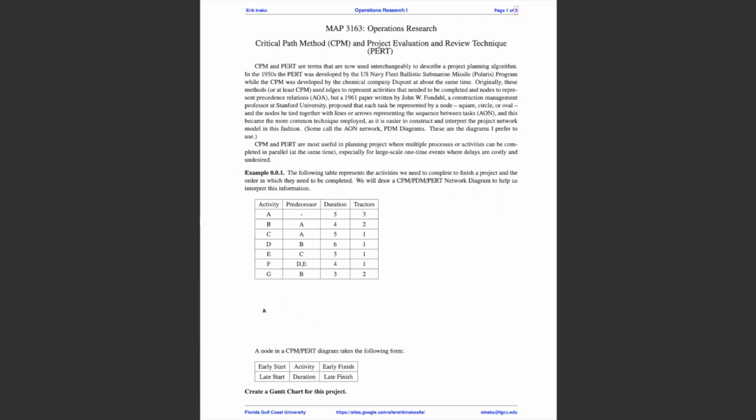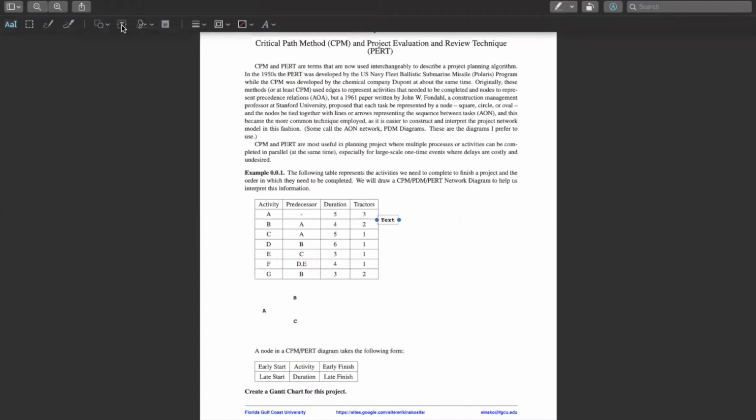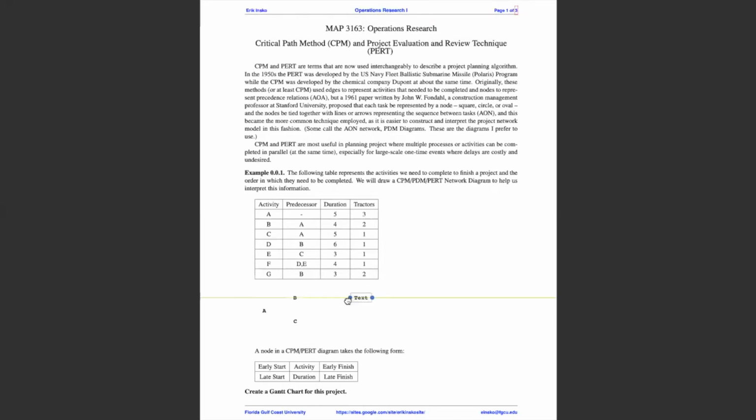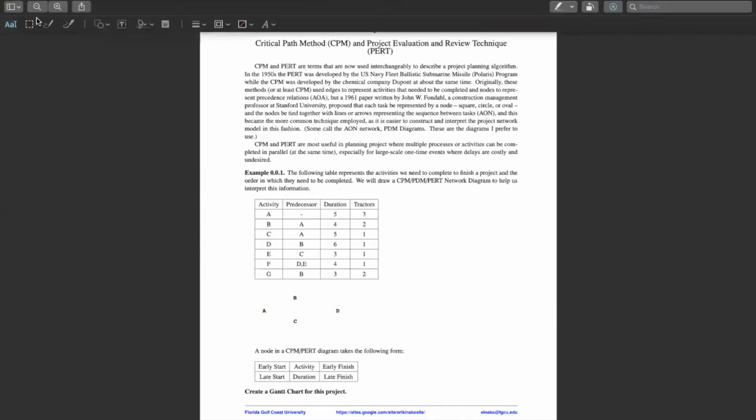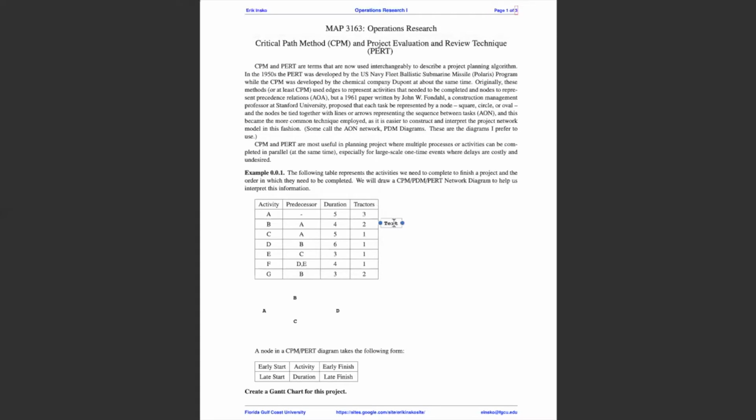So to show in what order we need to execute the activities, we can just create a simple graph where the vertices would be the activities and the arrows between them, or the edges, will represent which activity is done after each of the other activities. I'm just putting the names of the activities on the screen, and I put them in the order that they appear and closer to their predecessor.